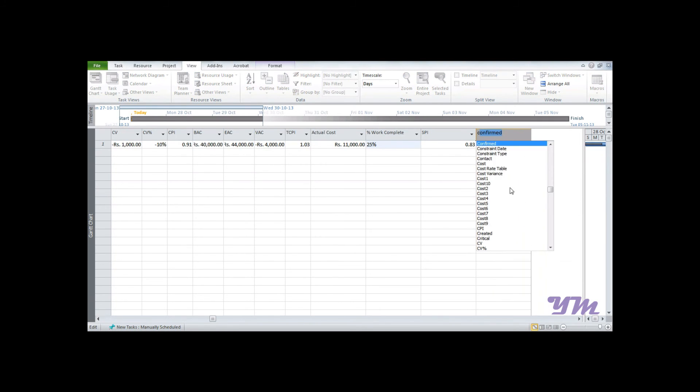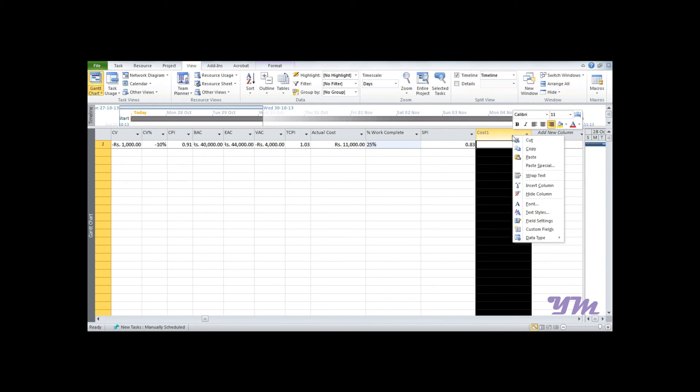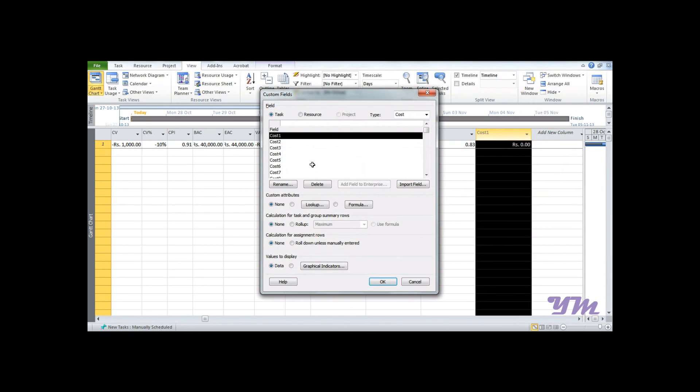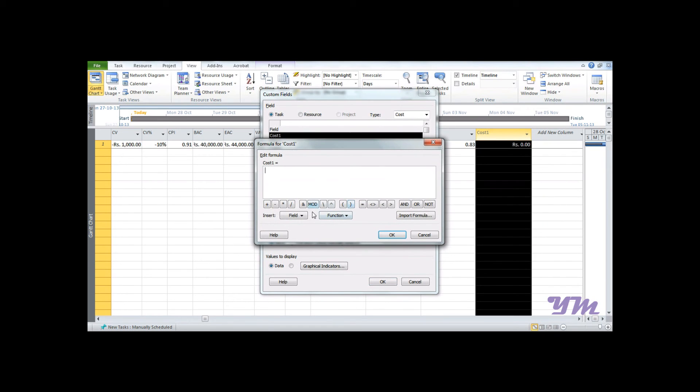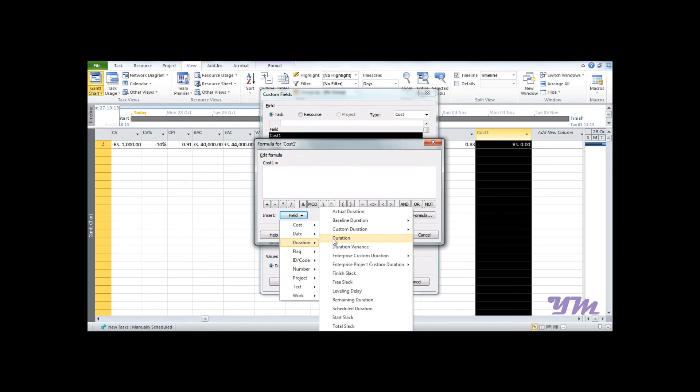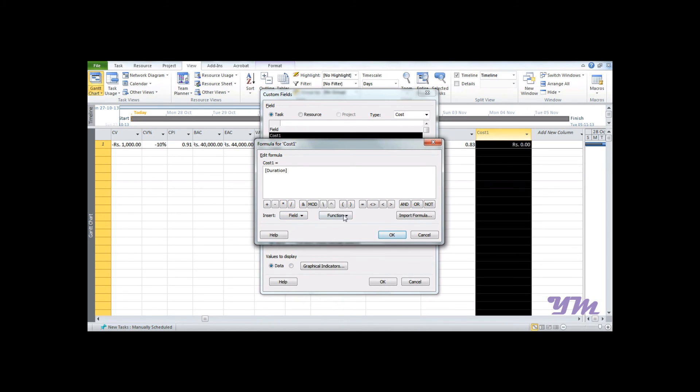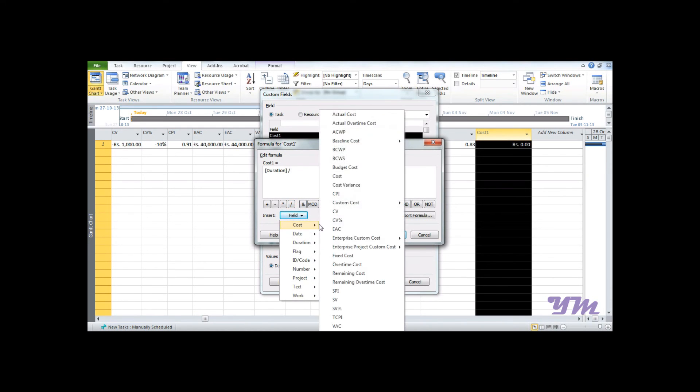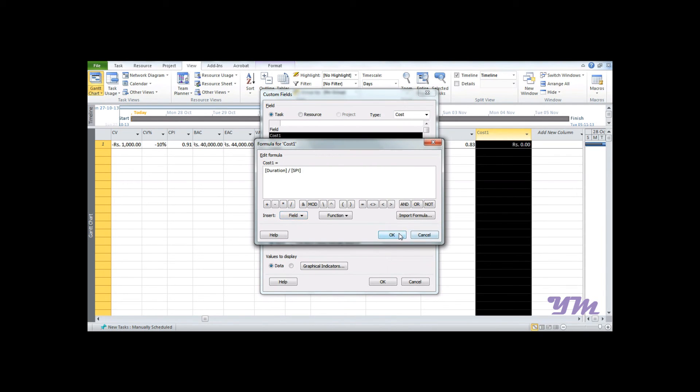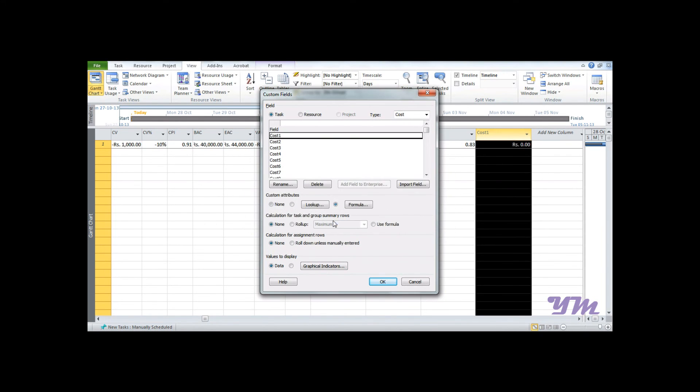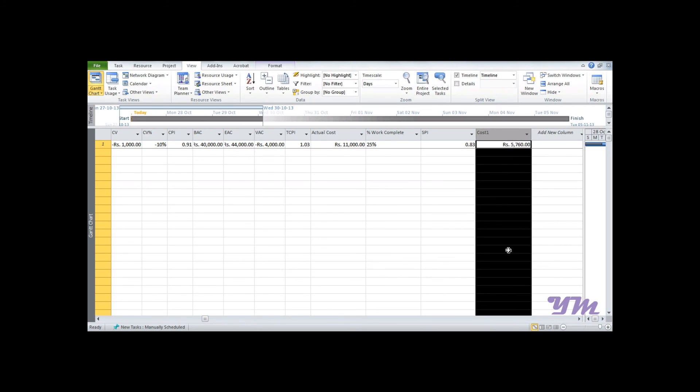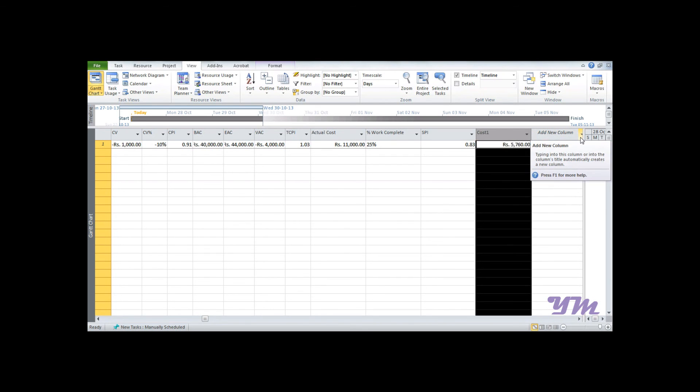Say Cost1. Go to Custom Fields, Formula, and we will add Duration divided by SPI from the cost field and click OK. You can see it's actually coming in rupees, but SPI is for the schedule. That's the mistake many people commonly make, so make sure you don't do that. You need to add a duration column instead of a cost.